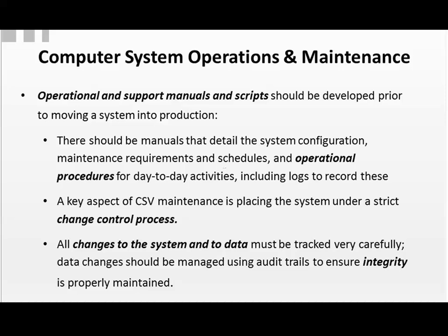A key aspect of the whole idea of keeping your system under change control is important for validation maintenance. You want to have a very strict change control process. Typically, a company has this as a separate procedure, but it could also be part of your overall validation procedure. You want to make sure that any change that's made to the system is evaluated just as you would start up a validation plan. You want to look at risk. You want to look at what impact this change is going to have on your existing code. You're going to want to look at some testing to make sure it's working properly.